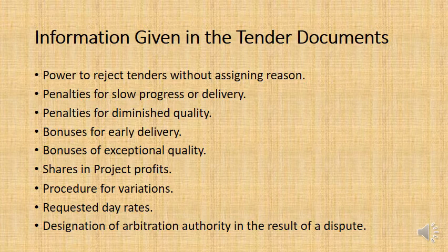And the arbitrator will be making a ruling that is binding. You sign beforehand that whatever the arbitrator decides, we agree to live by that decision. And that in itself is a legal document.